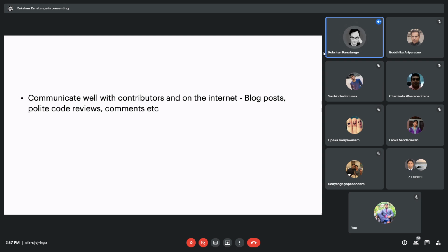And once they started gradually moving to the newer system, because their user requirements were added to the newer system, we swapped the login pages. So by default, they would log into the newer system, and if they wanted to log into the older system, they could do so by clicking the link.